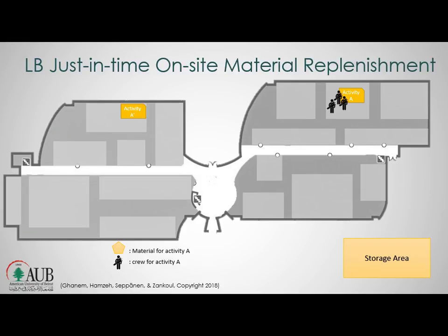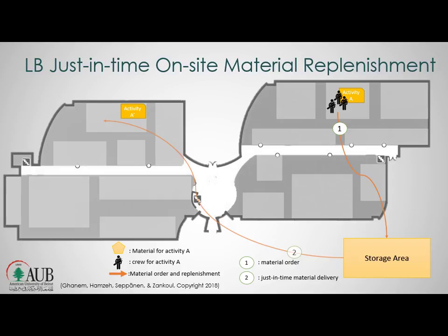Whereas if we follow just-in-time on-site material replenishment technique, the crews that are going to move into this location can send an order to the storage location, and the material is replenished based on the actual order. So with the right amount and at the right time and to the right location, the crews can move into the location and work productively.